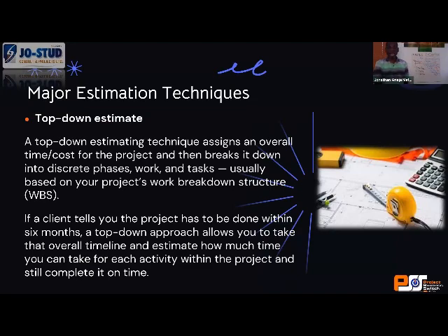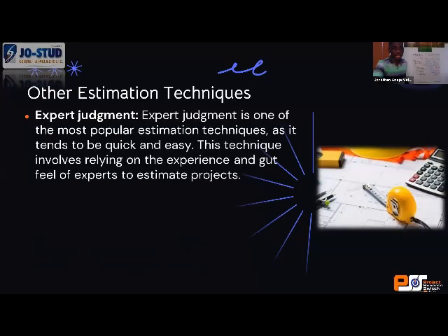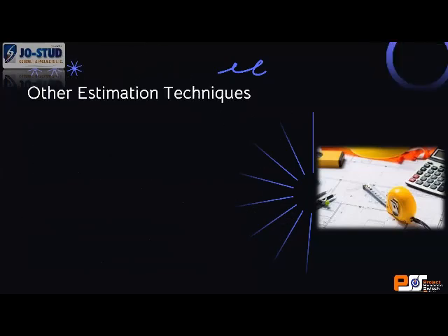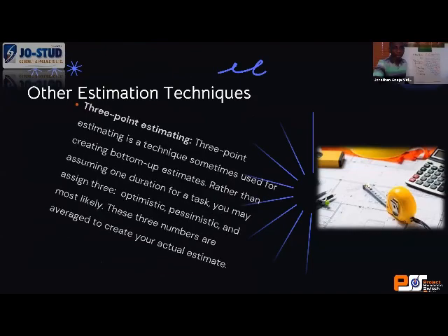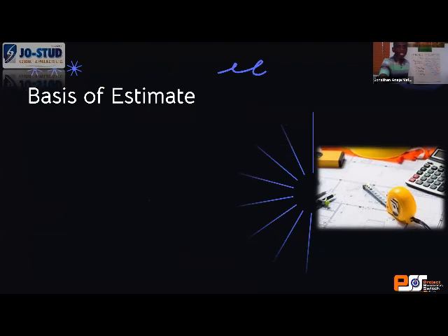You can use it. It's not just when the client gives it to you. In that case, it's called a baseline. You have given yourself a baseline. Okay, so you work within that baseline. So look at basis of estimate. What I'm trying to do with this is, if you are estimating, it's not good that you just give a client a figure of either cost or time, and you don't know how you arrive at it. That is what I want to say. It's good you know how to arrive at it. So this basis of estimate section will talk to us about what you consider before you beat your chest and tell your client that this figure I'm giving you for cost or time is tenable and it's viable and it can fly.